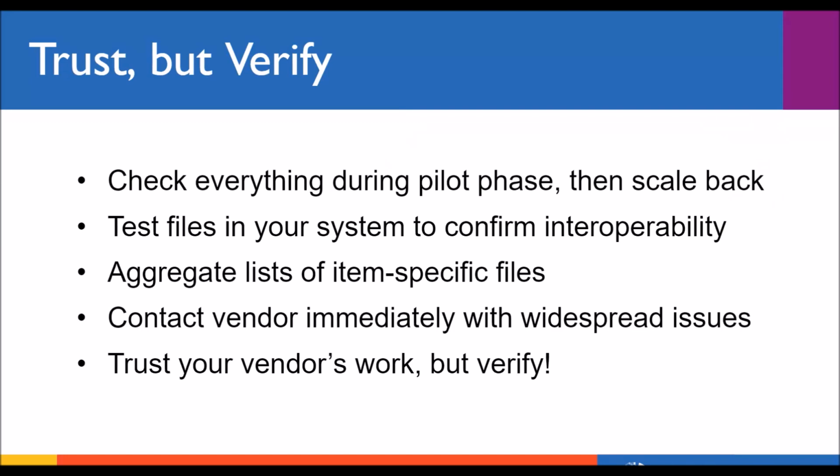In the pilot project, at least, you should be checking 100% of the files you receive. While during the full project, you'll likely pick some subset of files or parameters to fully check. At this point, you need to check everything.